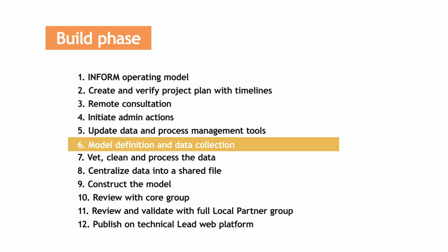Identify data sources. Also during the workshop, have all stakeholders identify datasets to populate the model. This is a wish list of the ideal datasets and sources that should populate the model for the best possible understanding of risk. Partners usually suggest much more data than are actually available as datasets for the final version of the model. However, this is an important vision setting exercise.